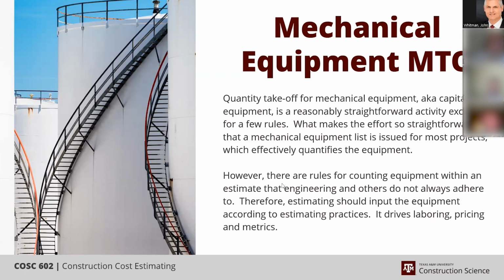if you use the point system, and what I think you mean by that is you count the fixtures, you know that each fixture is going to require supply and drain. You know that a water closet generally costs so much, with all the associated plumbing, and a urinal and a sink all cost so much, because we used to price electrical that way as well. A light fixture, exactly. The electrical point system used to drive me nuts, and I had no idea what that is.